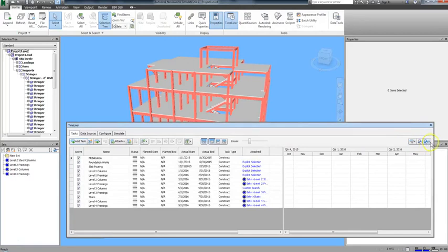When you click on it, it'll show you a variety of formats into which you can export your timeliner. The two that it's showing us right now are CSV and MS Project XML. This will export the data to a clipboard, where you can then save it in the appropriate file.